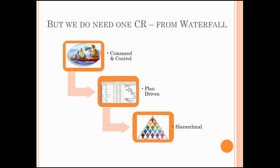When we talk about a waterfall mindset, the thought process flows in a certain direction. Waterfall is typically command and control driven, where we would have someone driving or running the entire show, navigating the project. We would work on a plan-driven approach, creating a detailed project plan based on requirements. We follow a structured approach: requirement clarification, detailed analysis phase, detailed design phase, coding or implementation phase, elaborate testing, user acceptance testing, and then we deploy a new product to production.